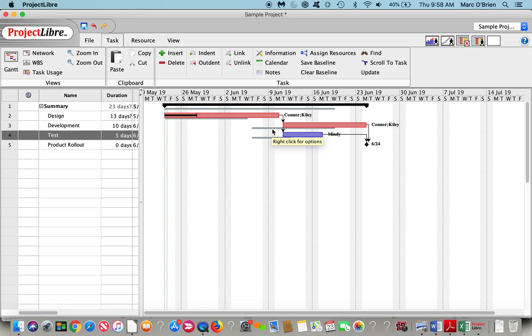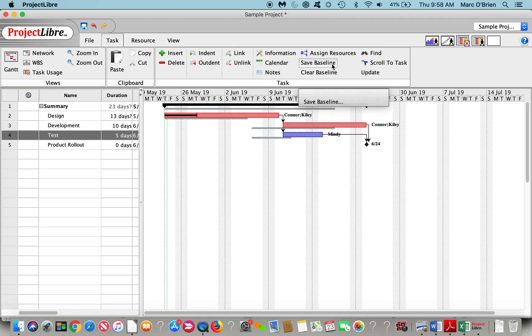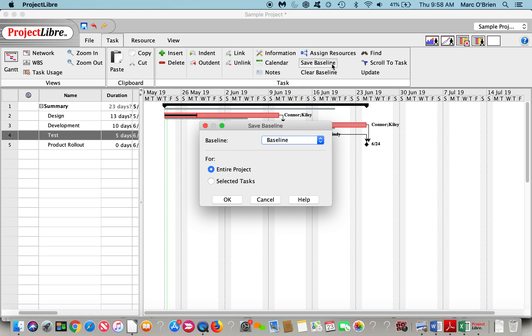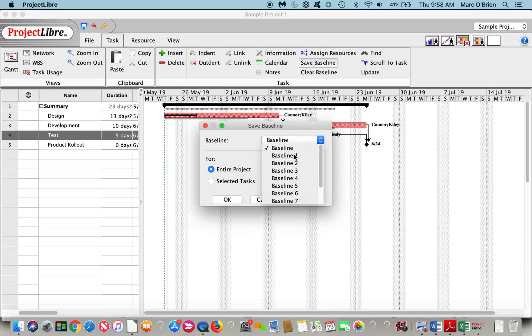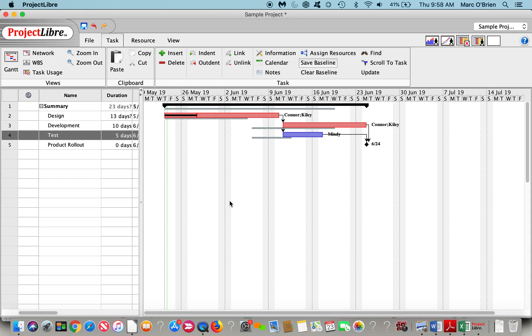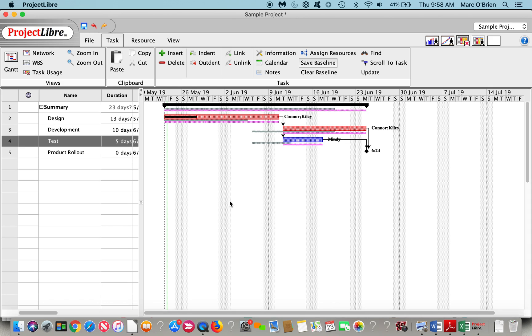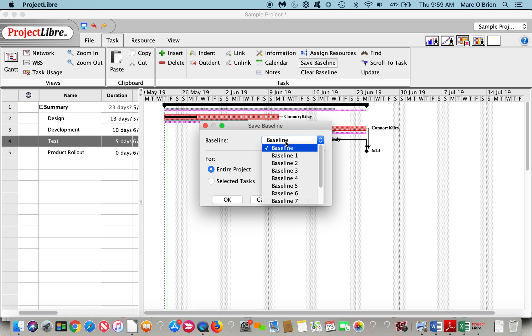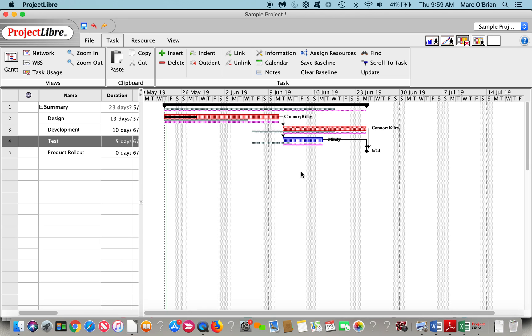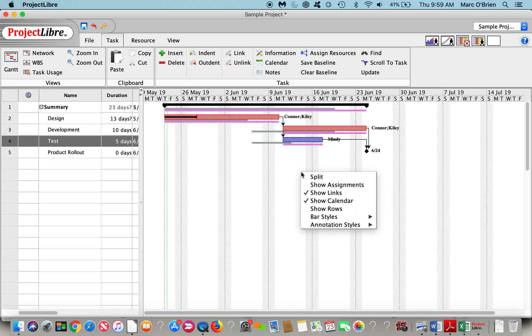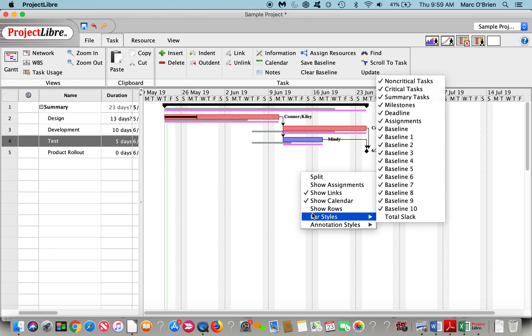I can save multiple baselines. If this is the new reality, we can re-baseline it. You can keep the old baseline, but this one I'm going to say is baseline one for the entire project. And you'll see the magenta line comes in and that's our new baseline. We can change that as well.